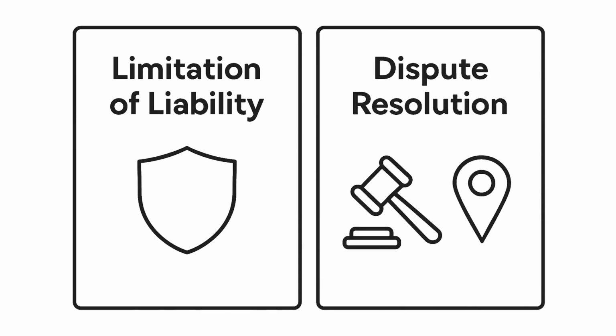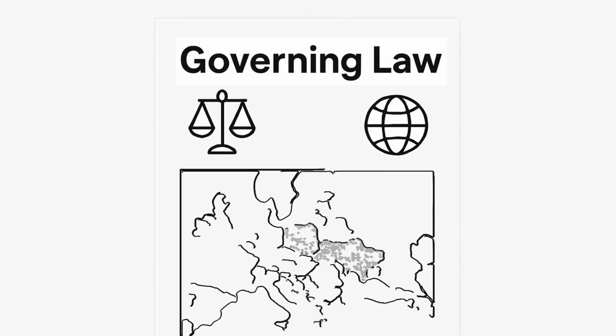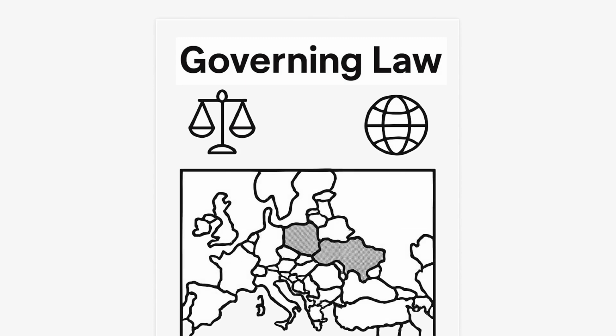Dispute resolution says how problems will be handled. Will you go to court, mediation, or arbitration? And in which city or country? The governing law clause tells you which region's laws apply to the contract.